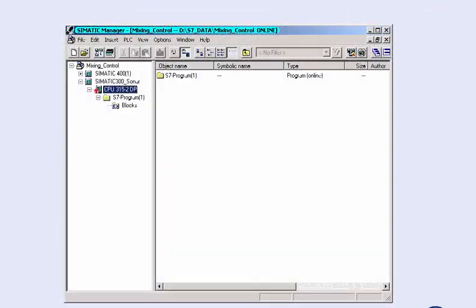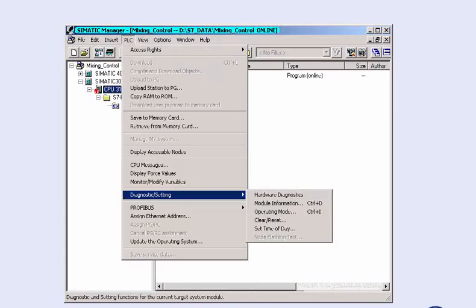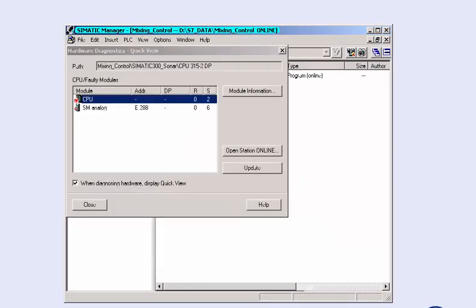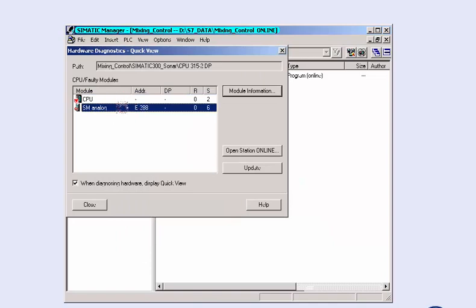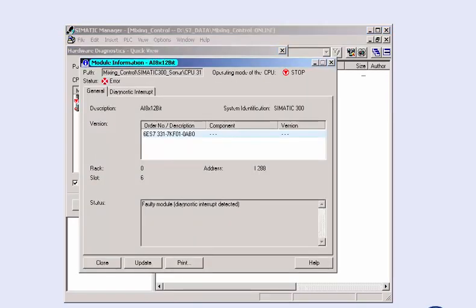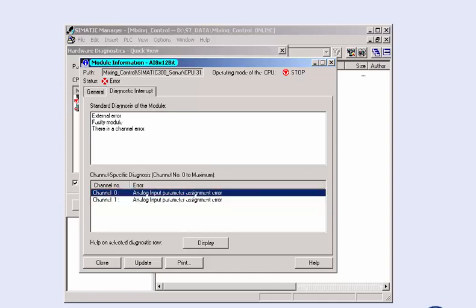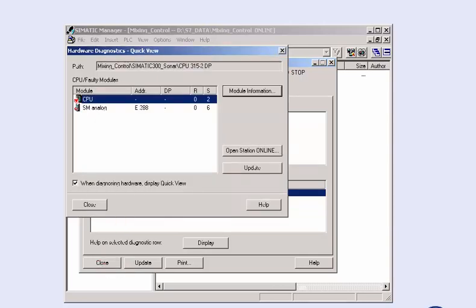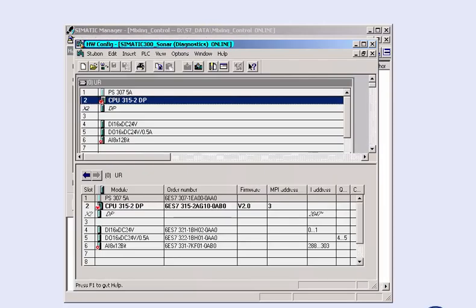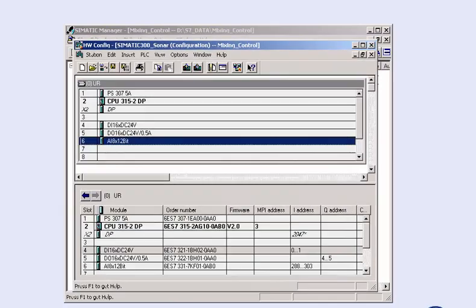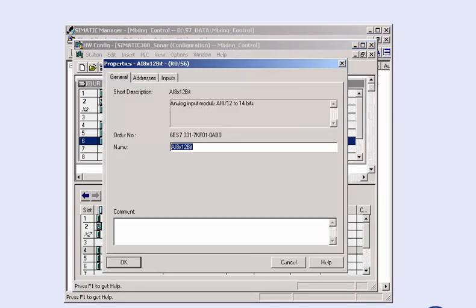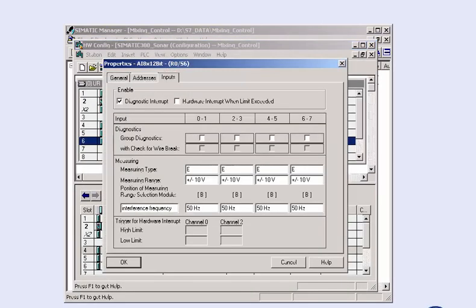With its detailed diagnostics options, the SIMATIC manager shows a quick overview of the causes of the CPU stop and subsequently offers you a detailed error analysis. In the window for diagnostic interrupts, you see that the stop cause is a configuration error of channels 0 and 1. From our configuration documents, we know that the connected sensor supplies a current value of 4 to 20 mA.